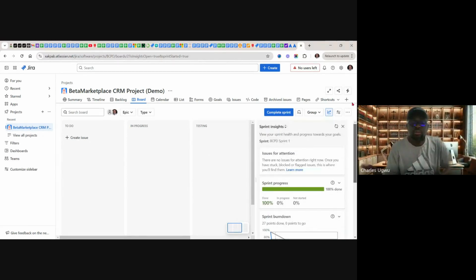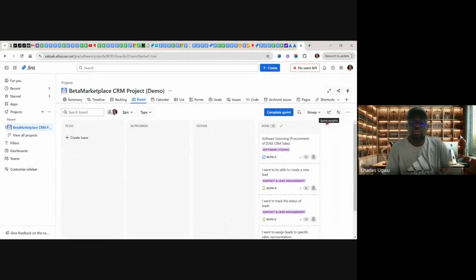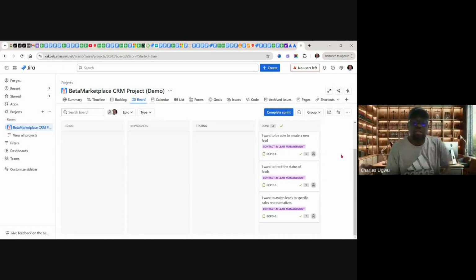Having done that, I want to bring your attention here. Yes, you've dragged everything to done. You just have to go. If you don't click complete, you cannot start another sprint because this sprint is still going on. There is no space for you to do that. So all you need to do here is click.